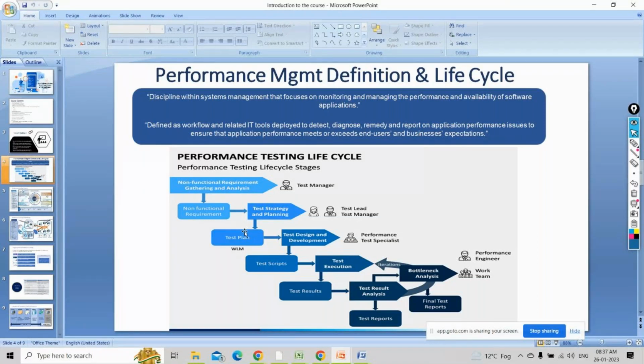Script development and design can go hand in hand. Once the NFR is there and you have the scenarios, you can start working on the script development part. But testing, like a smoke test, needs to be done before the test, once all the scripts are ready. In some projects scripting is easy, while some scripts take a little bit of effort. Usually we take about a week for, say, two scripts, which is more than enough to script them, no matter how difficult they are. But it depends upon the script, so you have to start them in parallel.